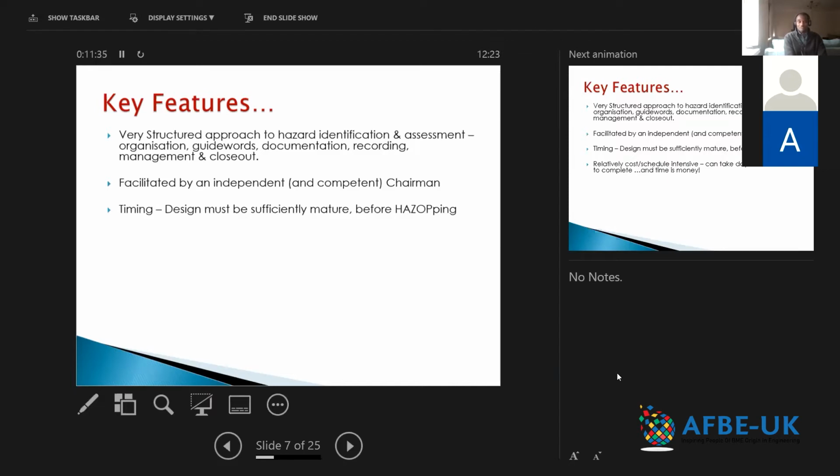And sometimes, for you to do a HAZOP at all, a worthwhile HAZOP, those P&IDs have to be, if you like, frozen at a certain stage of the design, depending on what phase of the project that you are at. So the design via the P&IDs has to be sufficiently mature. Otherwise, you're probably likely to truncate the HAZOP midway. It might become something different from a HAZOP, just because we're talking about so many design issues that should already have been finalized or completed on the drawings.